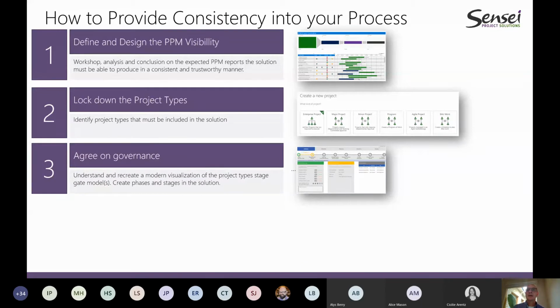The picture that you see on the right-hand side at the moment represents 7 different stage gates because it's a major project. I want to stress that point again. When organizations implement stage gates, it does not mean that every project needs to go through every single stage gate. However, every project should go through at least some of those stage gates. As I showcased earlier, in our instance, it's planning, execution, and closing as well.